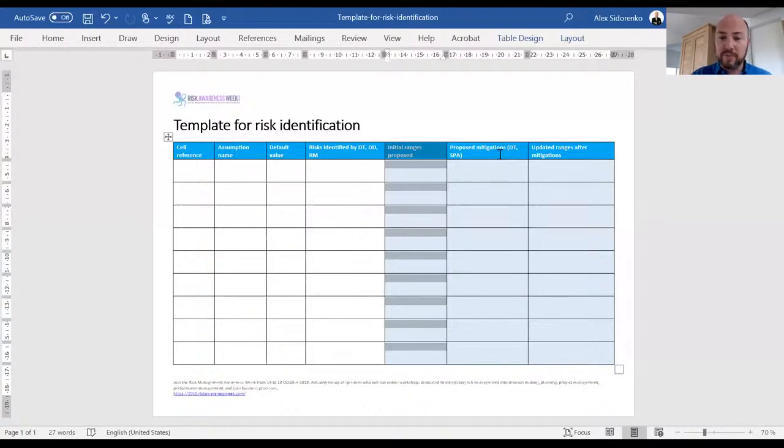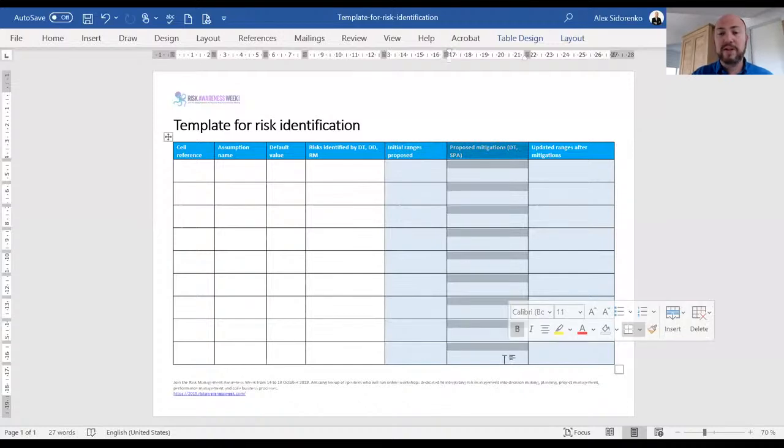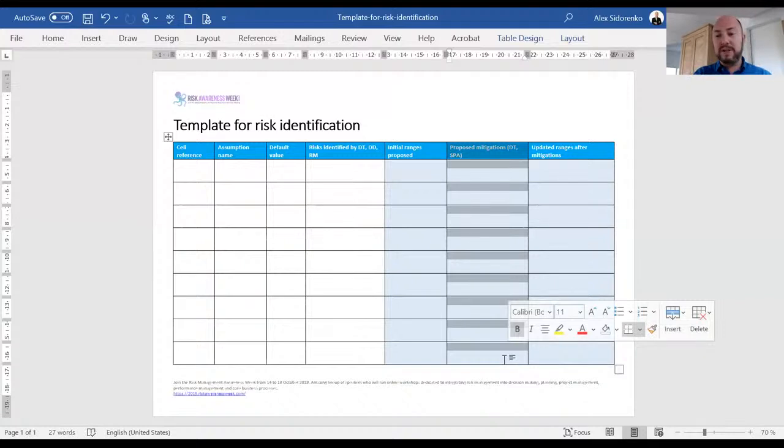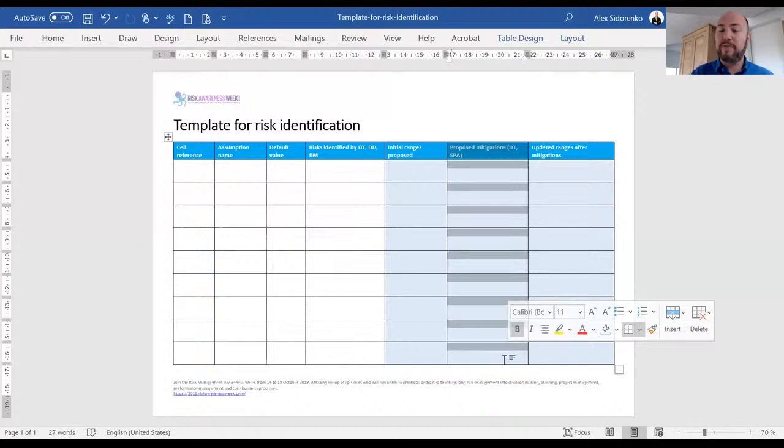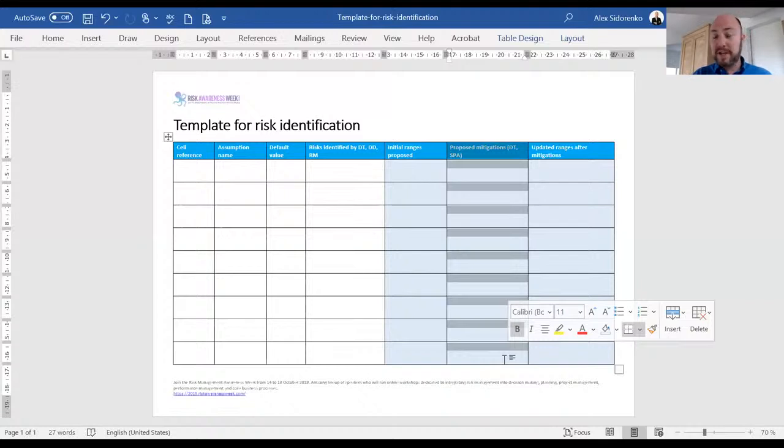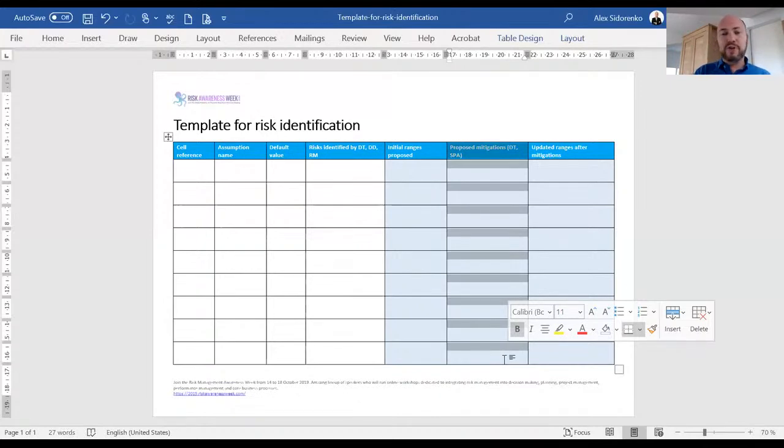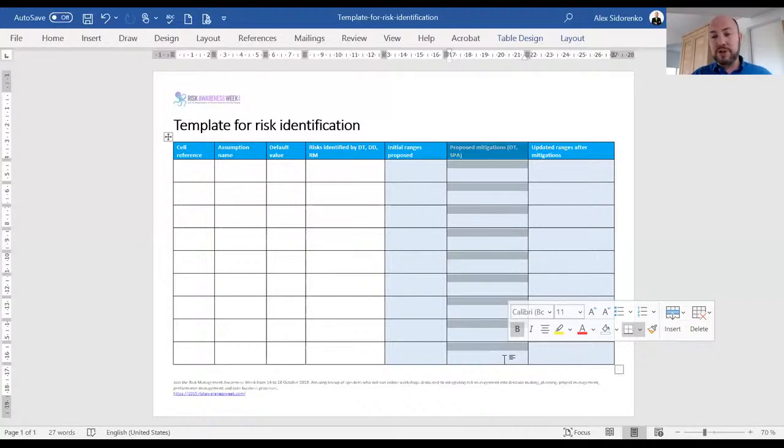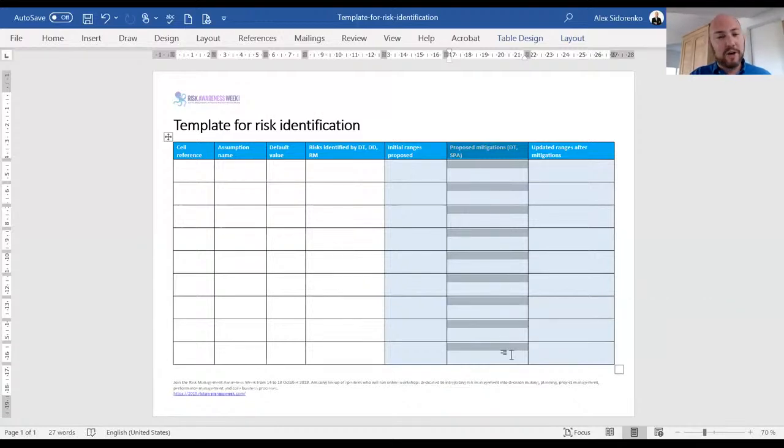The next column is very important. We now have another dialogue with the decision makers, with the key stakeholders, trying to identify what are the proposed mitigations. What are some of the mitigations that they are considering as part of making this decision? What do they have in mind to mitigate the risks and hence reduce the uncertainty, reduce the ranges, because that's essentially what we're trying to do during risk analysis. We're trying to seek additional information, take steps to reduce uncertainty associated with the decision.